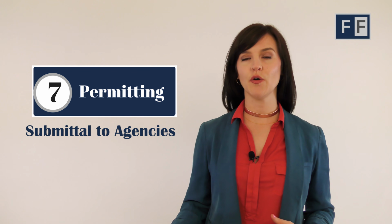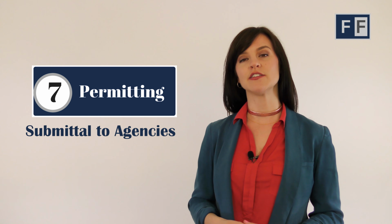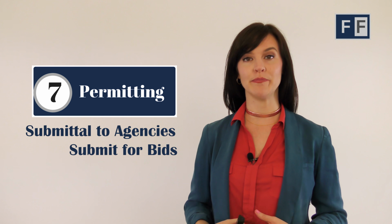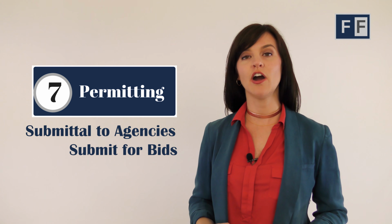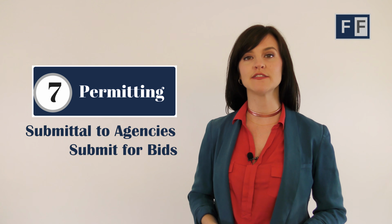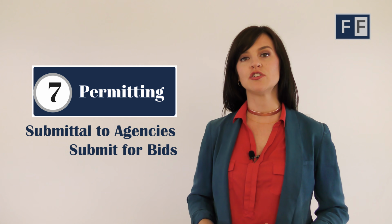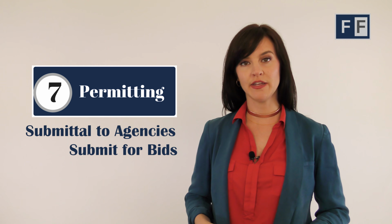Now, simultaneously with submission to the agency having jurisdiction, the architect is also going to submit your plans for bid. And what that means is the architect is going to produce either a CD set or a hard copy set of the plans for general contractors that you've pre-chosen, pre-screened to review and place a bid on.